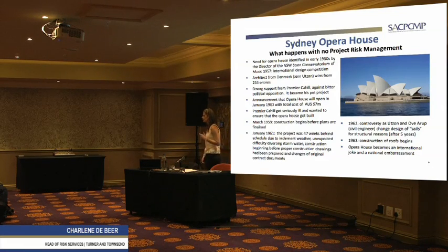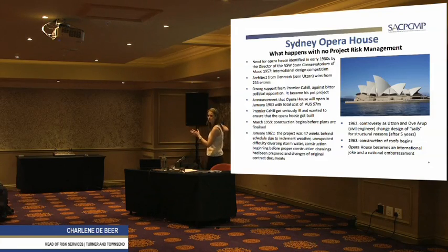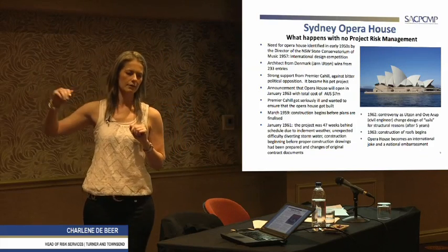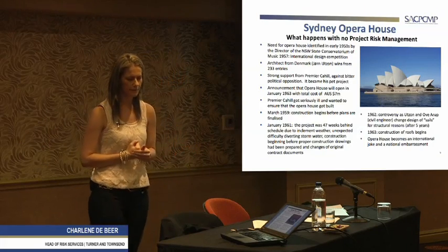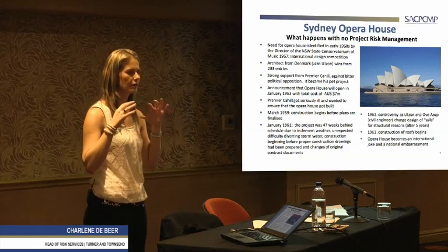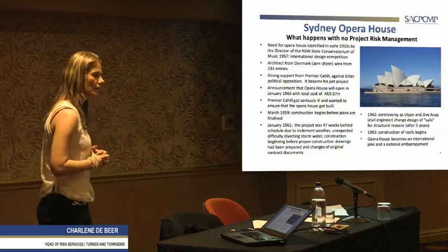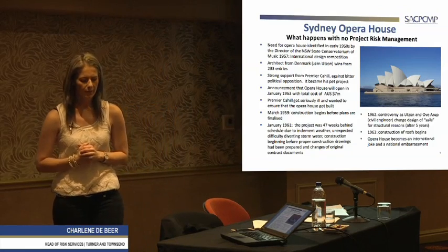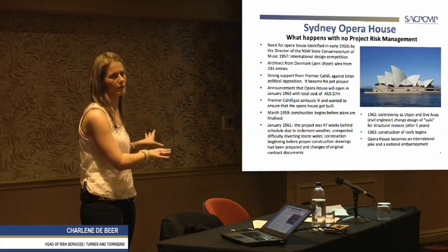The problem is, by the time they get to a 70% model review, they go, well, actually, if we want to do this, then we've got to change something that we've started already. And it happens time and time again on construction, that when the engineering starts changing, we start issuing revisions, red lines are being done in the field. The amount of chaos it causes within a project construction environment is sometimes devastating. It has your compensation events, so it will cost you time, will cost you money, of which the contractor will probably be liable to. And we've started the project wrong in that sense.